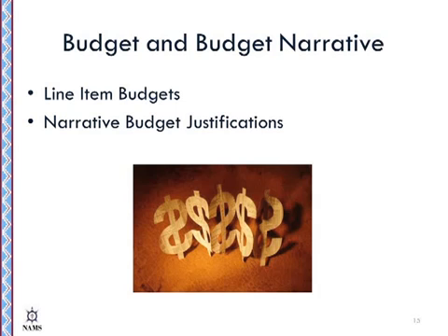We already discussed budgets and budget justifications under the required resources key element, but I want to emphasize that when you create your budget, you include the cost for all activities described in your OWPs and project strategy. The budget and the OWPs are the two parts of an application that should most closely align. It's not uncommon during panel review of the applications for reviewers to find costs in the budget that are not discussed either in the narrative or in the OWPs. Including the cost for a riding lawnmower in a budget for a language application might raise an eyebrow, unless its use is described in your narrative and activities included in the OWP.